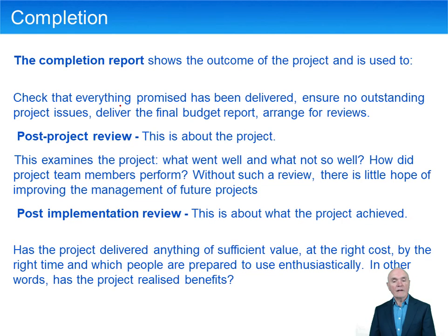Finally, we have the completion of the project, and there is a completion report normally expected showing the outcome of the project. And this is used really retrospectively to show which bits of the original plan that was promised have actually been delivered, to see whether or not there are some outstanding issues that maybe have to be completed within the next few months and so on, to see if we stayed within the budget, to see if we stayed within the deadlines and the scope and so on.